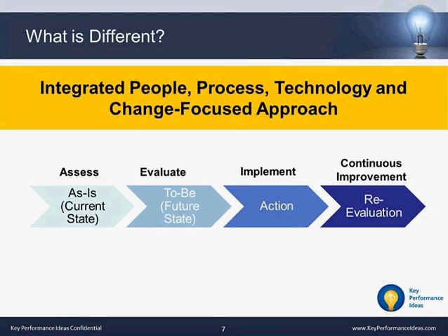I like to group the four major phases for a project as follows. An assessment phase, where you're really looking at where are you today? What is the current state of your organization? Where do you want to be? And that's the evaluation phase, or the to-be. The implementation phase, or the action. And then ultimately, if not the most important piece, is the end. Once you've deployed a solution, looking at ways to immediately start improving and preparing for improvements in the future. So, continuous improvement.